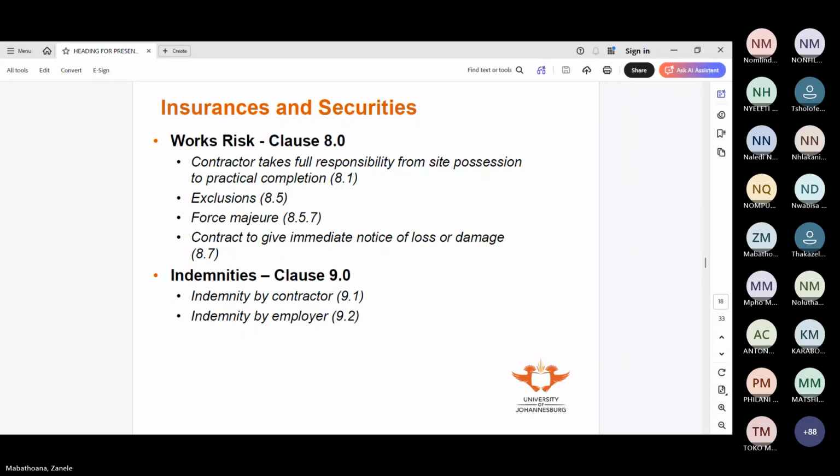What happens in a project of that nature, or rather, how would you handle something like that? Okay, so basically the way the JBCC is structured, we work on a provisional bill, so a remeasurable bill. We have the bill of quantities that we remeasure as we go along. So it's not fixed unless in the contract we state that it's fixed.